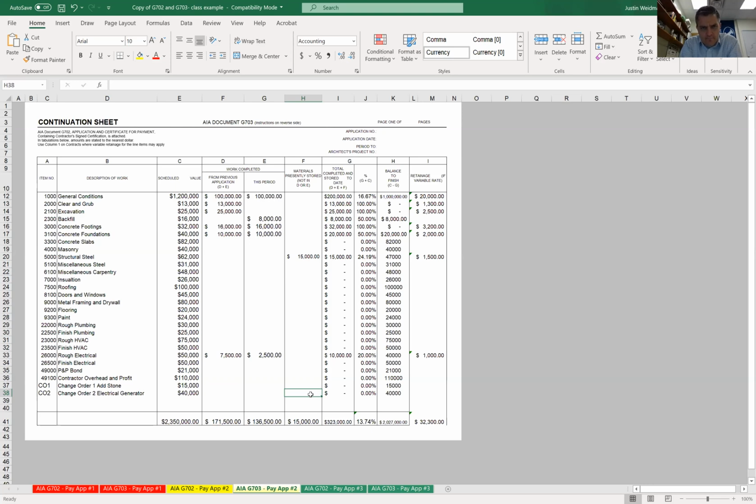And then, other things that come with bills: when you pay your contractors or when the owner pays you, they are going to request with every check that you get or that you send out a lien release, which means that the person getting paid signs a form saying, I have been paid for this work that I've billed for, and I am signing away my right to lien the project for this amount.